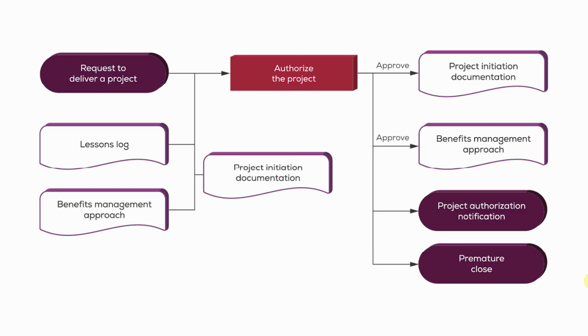Now, something else which could of course occur at this point is that the contents of the PID and the benefits management approach could be such that the board don't believe that the project is worth actually authorizing, that this project is not really worth delivering, in which case, in consultation again with corporate program management or the customer, the board are likely to come to a conclusion to terminate the project prematurely. And so it is a possibility that premature closure could be triggered at this point, and that would result in the triggering of the closing a project process.